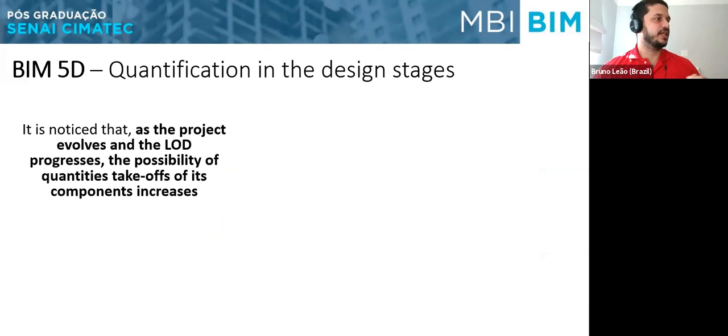We also have to have in mind that as the project evolves and the LOD progresses, the possibility of quantity takeoffs of its components increases. And that's just the point that I try to make, the link with the kinds of budgets. At the start, we don't have enough information to do our operating budget. So we have to adapt our budget process to be able to have results that can help us to develop our enterprise.